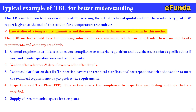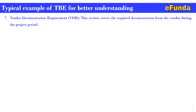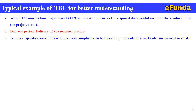Fourth, inspection and test plan, ITP — this section covers compliance to the inspection and testing methods that are specified. Fifth, supply of recommended spare parts for two years. Sixth, supply of recommended commissioning spares. Seventh, vendor documentation requirement — this section covers the required documentation from the vendor during the project period. Eighth, delivery period — delivery of the required product to the site. Ninth, technical specification — this section covers compliance to all the technical requirements of a particular instrument or entity specified as part of the material requisition. This is how the details of the TBE are covered.